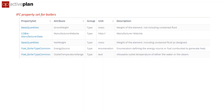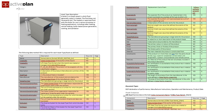Some assets need more than standard COBie, so the template can include any specific additional attributes a product type needs, like outlet temperature range and the standard information for anything that's electrically powered. Activeplan automatically produces the contractual requirements as a Word document with colour coding matching the COBie British standard, along with the work stage at which each set of information is required, which can feed into a master information delivery plan.